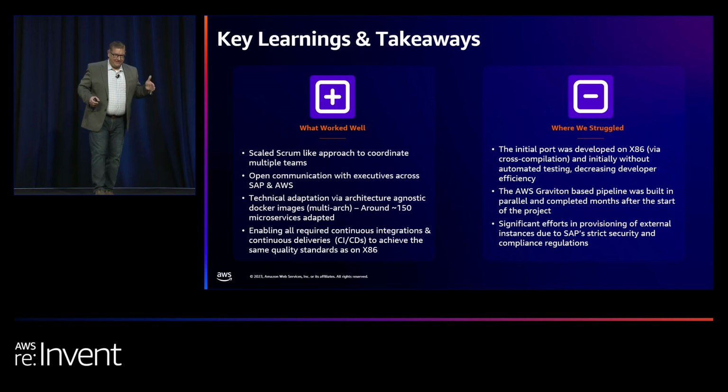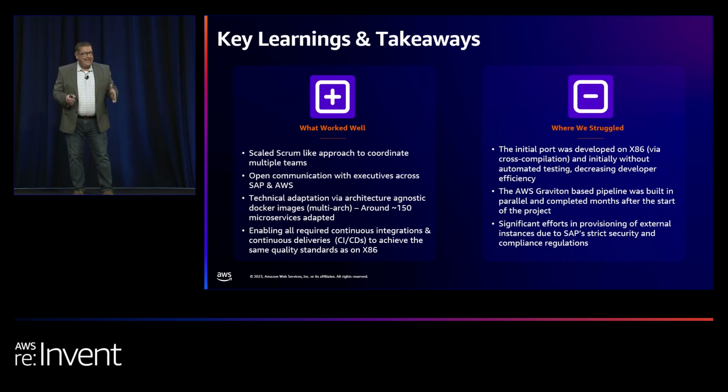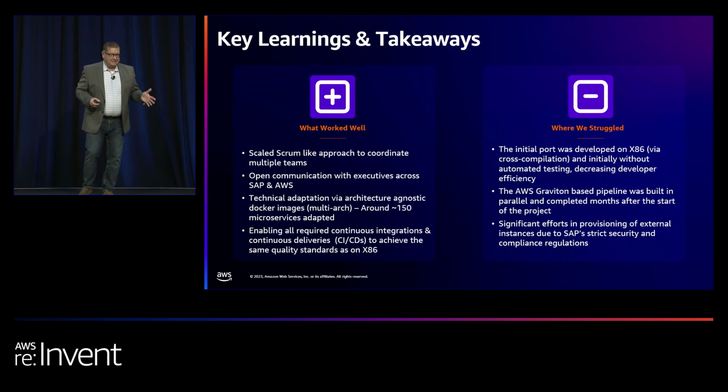I think you probably saw that on the timeline where we did the initial port, and about 6 months later we had the CI/CD pipelines and the microservices and things like that. So that caused us some struggle with developer efficiency.